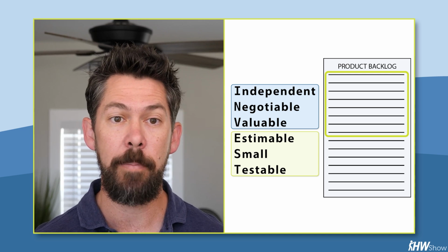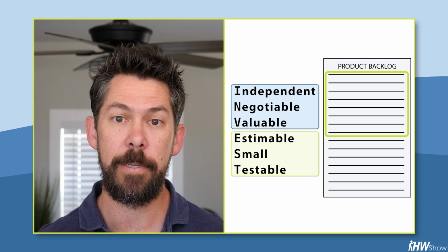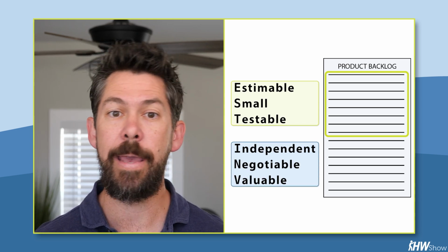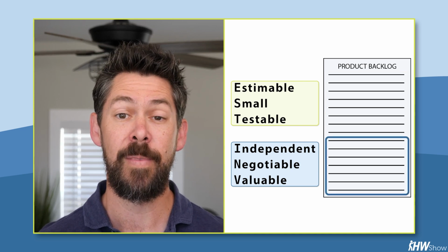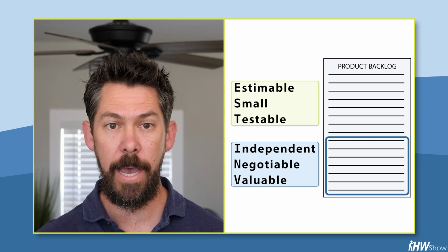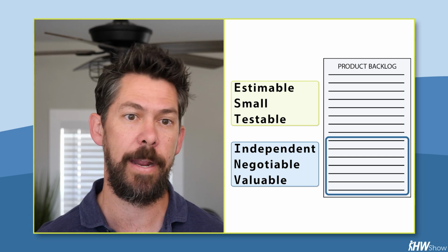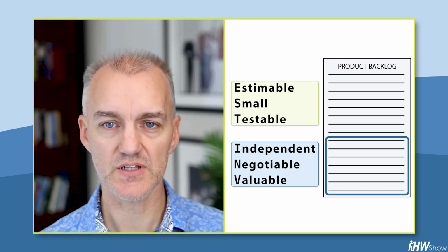We care a lot about being able to estimate and plan reasonably accurately. We care about being able to test that the work is done. You go further out, and INV matters more. Bigger slices with clear, independent value and plenty of room for learning and for conversations. As items move up the backlog and you slice big things into smaller ones, you just naturally trade INV for EST, and that's okay. Yeah, that trade-off makes a ton of sense.